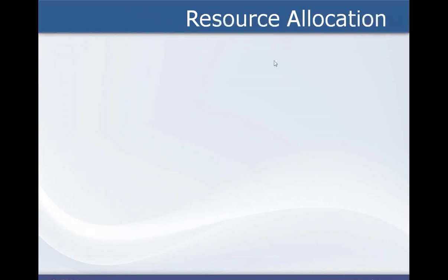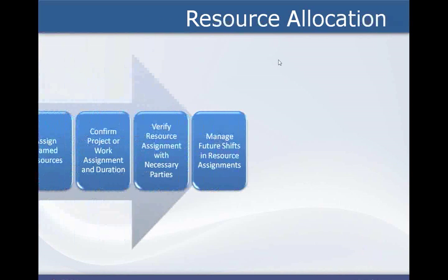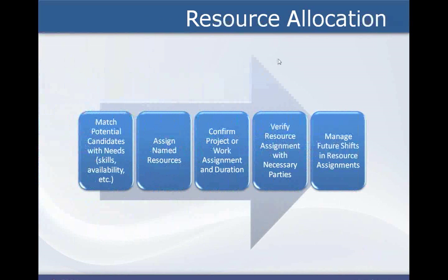Now it's time to assign your project team. Before we do, we must look at all factors involved in this process. Who is available and when are they available? What competencies or experience do the resources possess? Have they worked on a similar project in the past, and if so, how well did they perform? Are they interested in working on the defined project? And finally, how much will it cost to obtain the resource for the project?